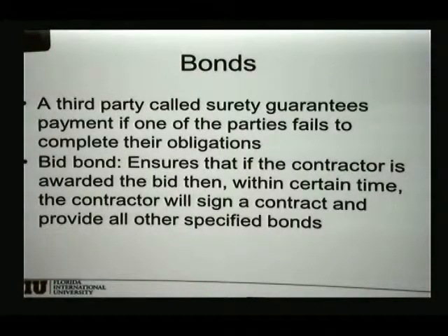So they set up a performance for you to match, and then attach a performance bond. So if you don't perform in the way that the customer wants, then they will get paid. But then the bonding company, which is a surety, the third party, will go behind and try to collect that money from you. That's the difference between insurance and a bond.